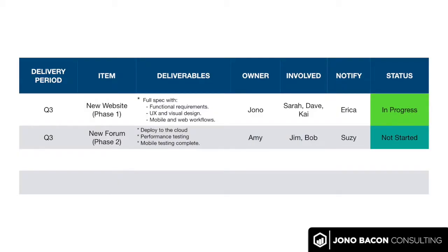Anyway, so what you do is you basically say for each of those things, this is that time period, this is the thing we're going to work on. And then importantly, you don't add anything to that list unless it's got a clear set of deliverables.